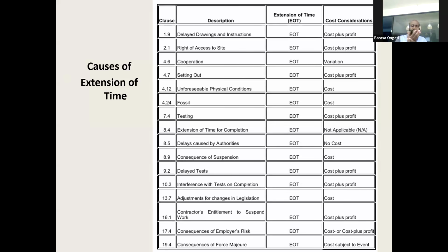Well, if there's a change in rate that is directly proportional to the quantity increase, then you are entitled to the caveat which is given right under paragraph B. But remember, there's the word "and" right after that clause. So all those conditions have to be fulfilled. It's not only the change in rate. Now I understand your question.